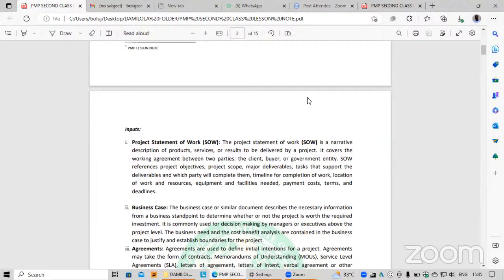The Project Statement of Work is a document developed by the sponsor of that project, your client, your major stakeholder, stating what the deliverable of that project should look like. So in order to develop the project charter, especially the scope, correctly, requesting the statement of work of that specific project from the sponsor is very important. Now, it might not be applicable in all cases.